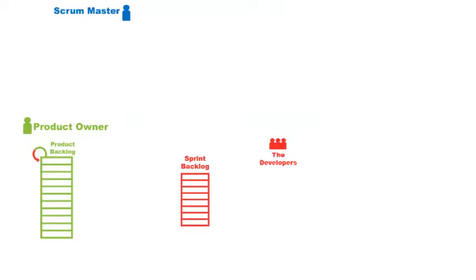The sprint backlog forms the plan of the items that the developers expect to deliver through the sprint. This may be broken down and described as tasks they intend to complete in order to deliver each product backlog item, or as tests that describe the work that must be completed so that each backlog item can be considered done.